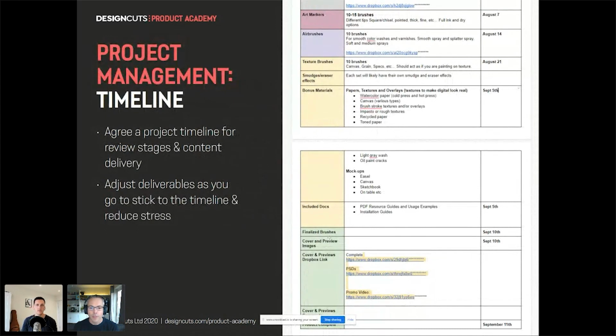Well, for the exclusive products, obviously we have to work to a timeline. So the way we worked was we had a launch date, and then we had a massive scope, and we had to work out what we could do within that timeline. If someone is putting together their own product, I would say work the other way around. Break it up into all the chunks, guesstimate how long each of those chunks is going to take, and then have a launch date from that in the future. And if they think that launch date is too far away, then perhaps reduce the scope of the product.